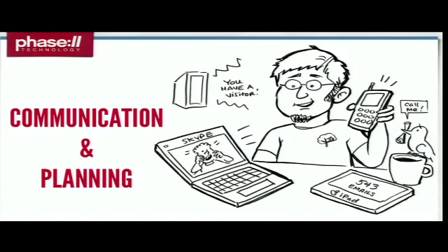Yeah, so let's talk a little bit about how to prepare for a big migration. One of the most important aspects is communication and planning. So it's absolutely essential up front that you establish some kind of a communications plan amongst everybody on the team that stipulates not only how you're going to communicate amongst the project team members, but who communicates with whom.